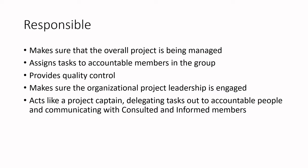The product development piece might be overseen by a product developer, and commercialization by someone in operations. It's okay for responsibility to be passed along as long as it's deliberate. Someone needs to be responsible for each task. The responsible person can assign tasks to accountable members, provides quality control, and ensures leadership — such as executives, board members, or investors — are engaged and the project is going in the right direction.